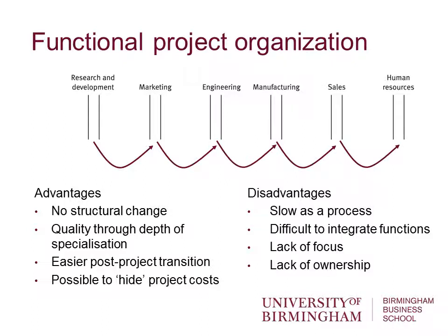The disadvantages are it's slow. You're moving the project from point to point to point. Different functions are having their input, going away, thinking about what needs to be done next, having their input, going away. It's very difficult to integrate the different functions. Who has priority, who has responsibility. And there's a lack of focus. Focus is on business as usual activities, and so attention is being drawn away from those business as usual activities to the project, and this means that often that focus is not necessarily clear.